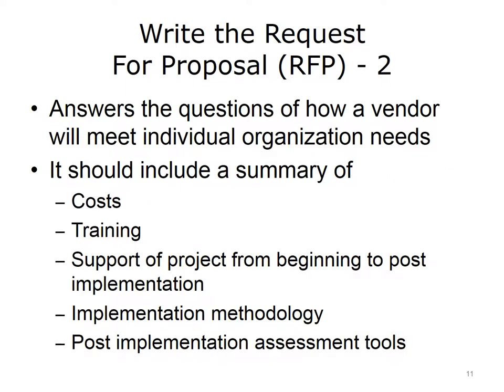A vendor's response to an RFP should answer questions about the system and services sold by the vendor, and how they will meet the organization's specific and individual needs. The response should also include a summary of costs for new and upgraded hardware, the cost for software including interface and system software, and a basic summary of the training offered in the pre-implementation, implementation, and post-implementation phases. Vendors should offer product support throughout implementation, beginning with the pre-implementation stage and extending through the post-implementation stage. The vendor response to the RFP should include a detailed plan for the EHR implementation as well as post-implementation assessment tools to gauge the level of success.